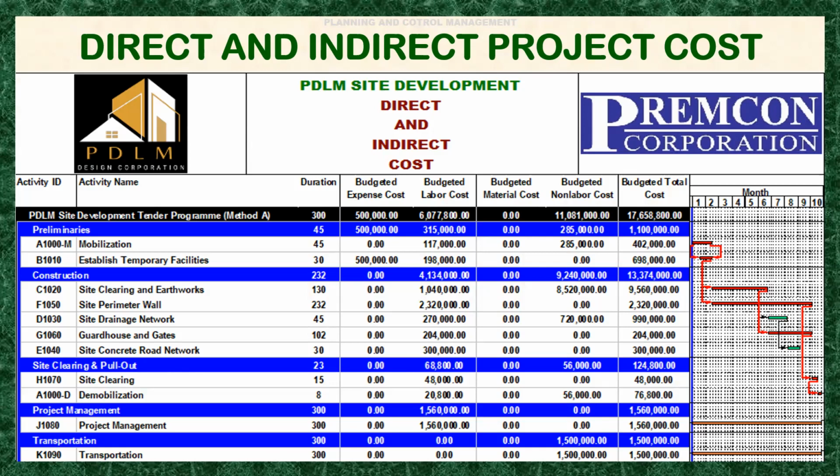For example, we have a markup for the overhead. The overhead mostly comprises utility costs, stationery, insurances, fees, and many others. The same thing with contingencies. It will make up for unavoidable material wastage during construction or any unforeseen estimate errors and many others.